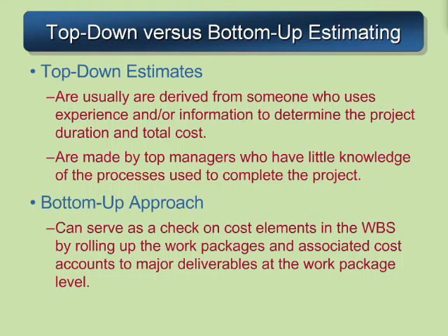to see whether the project makes sense to do. The bottom-up approach can serve as a check on where you're at with your work breakdown structure, the individual tasks, and also give you a reality check to how close those top-down estimates relate to the bottom-up estimates that you came up with when you drill down to the lowest level work package.